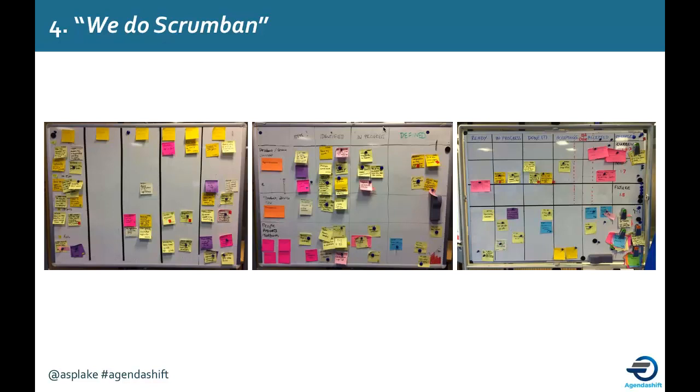It certainly shows a development process, work starting, ready, in progress, to done here. I always quibble over columns called done, but this meant development done, and then an acceptance and testing process. What you won't know from just looking at the screen is that the number of items in progress is a number very much smaller than the number of developers.